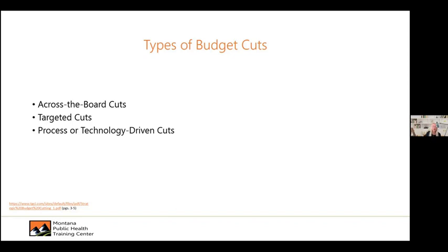So it's important to remember, though, that cutting budgets and cutting costs are not the same thing. I'll say that again. Cutting budgets and cutting costs are not the same thing. Cutting the budget gives the organization a plan for lower spending. But achieving this plan requires discipline and specific decisions on hiring and buying that are made throughout the year. So a program with a strong culture of taking budgets seriously and managing to budget will find that reducing budgets results in lower spending by the managers.